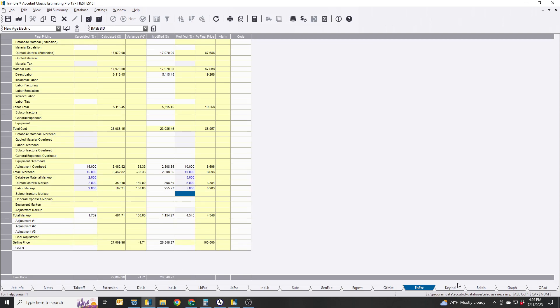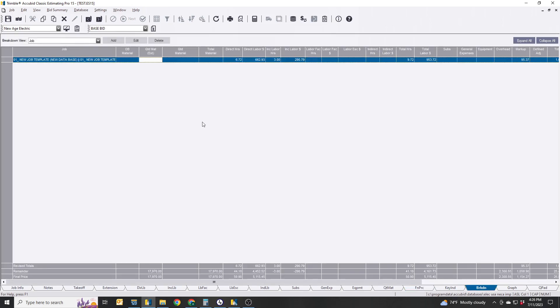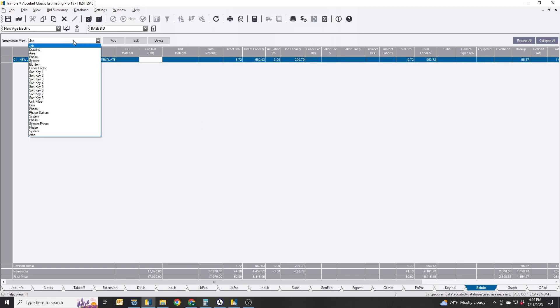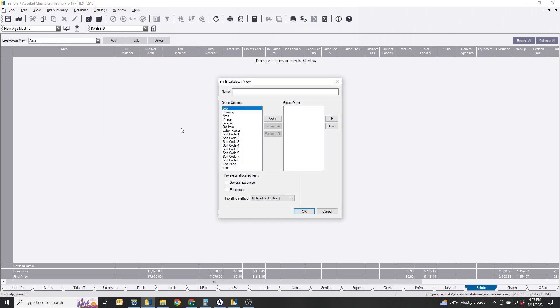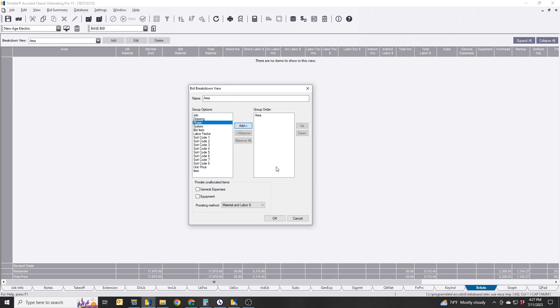You're going to see this bid breakdown. Now if you need a breakout of each area because the owner wants to know what he's paying for, maybe charging it to the tenant, whatever the case may be, you can go to Breakdown View and then go by Area, hit Add and then Area. It'll break it out in area. If you do have any other expenses that might be associated with this whole job, click these two and it'll basically prorate it to each of them, basically evenly break it out across each area.